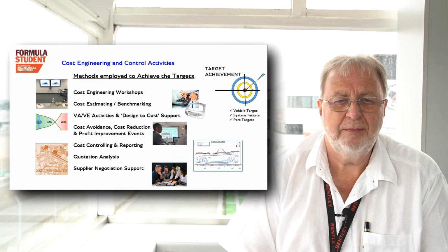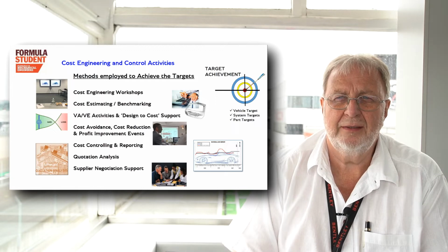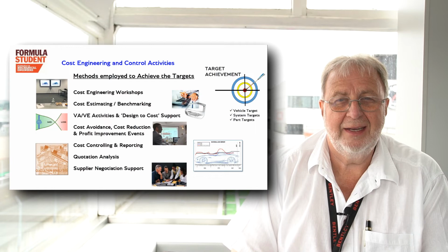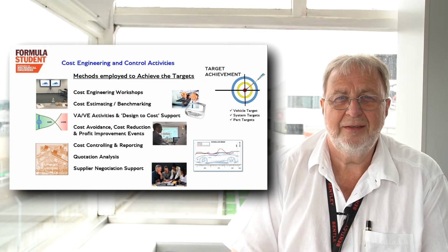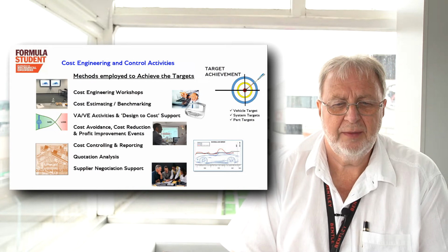Cost avoidance, very important. When you move into a cost reduction phase, it's really too late. If you can avoid putting cost in at the very beginning, you're not paying for any tooling that you don't need, and you're not retooling or wasting time and resource.